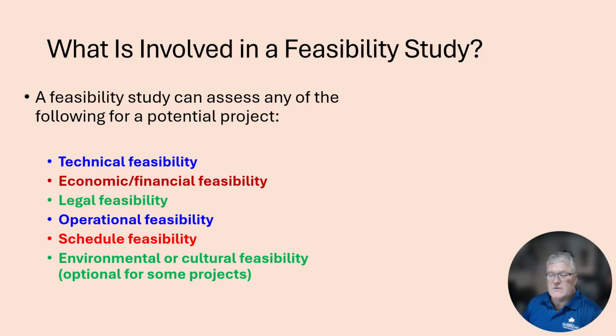What's involved with the feasibility study? Well, in a feasibility study, several areas can be investigated. Not all of them have to be investigated, but there are some that definitely are included in a feasibility study. So, one of the areas that can be investigated is technical feasibility. Well, whether you have the hardware, the software, the manpower, other resources, and so forth that will allow you to do the project. Then you have the economic, financial feasibility. This one's definitely going to be involved with the project because most projects have some financial measure attached to them.